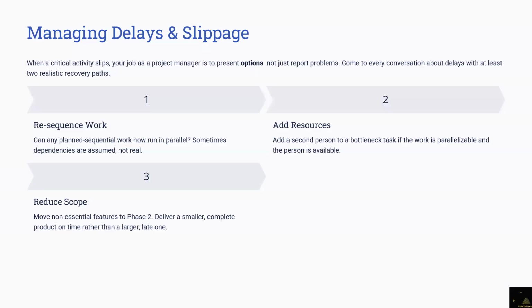So at phase one, there's something called the minimum viable product. A minimum viable product can still be delivered. Something can still be delivered at phase one so that we can get going. So for us to get that minimum viable product, maybe we can remove some of the items into phase two. The technical guys will advise. Okay, let's move these things to phase two, so that way we can finish phase one. All of those judgments come from them.